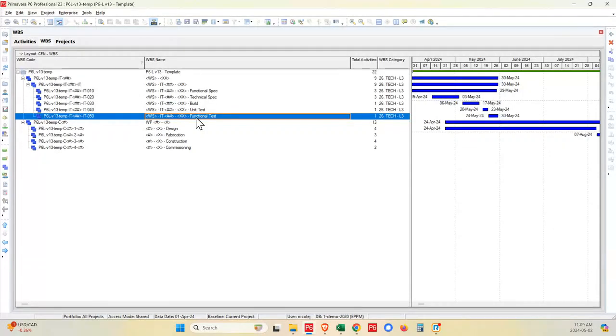Okay. So as an example, in this IT program, we don't have all the work scoped out. We know all the testing is going to come later. So we're going to build a template for testing. We're going to run that in after. Okay. So it lets you build your project out phase by phase as needed as well. But we're still going to be able to take advantage of bulk loading, so I don't have to do a bunch of stuff manually.